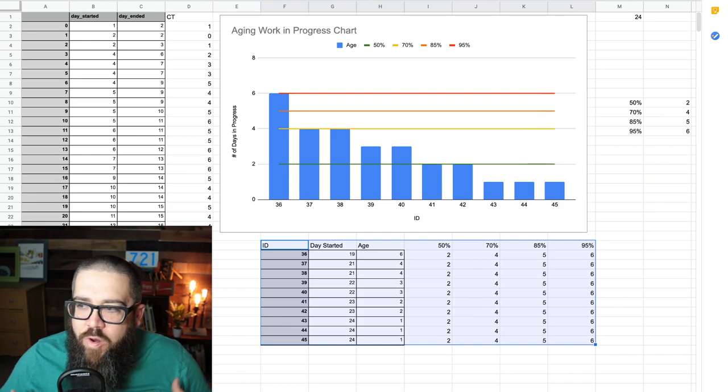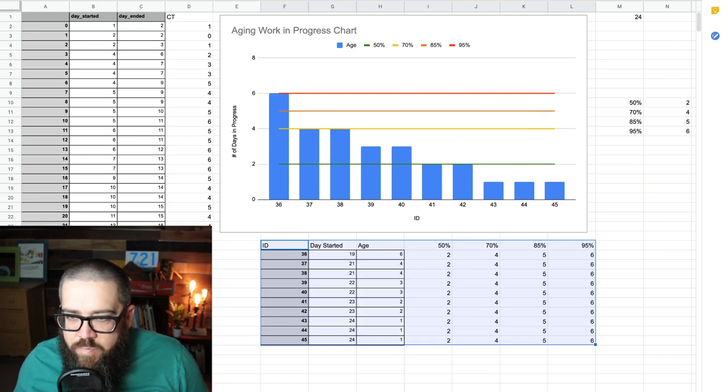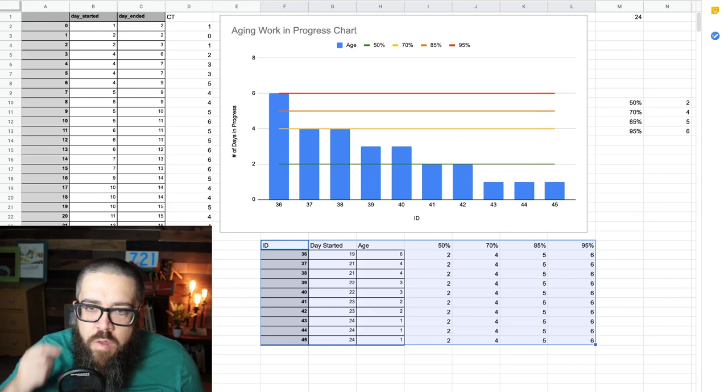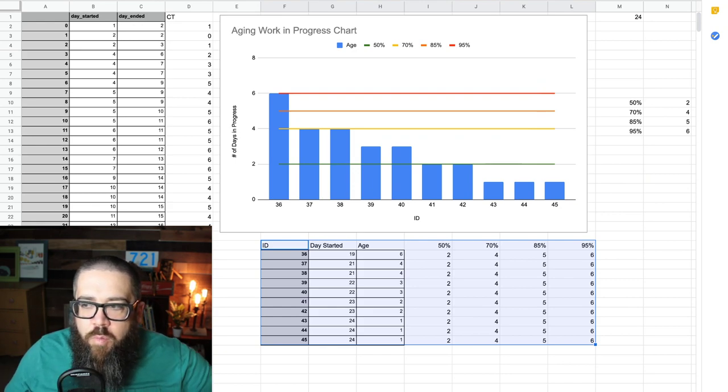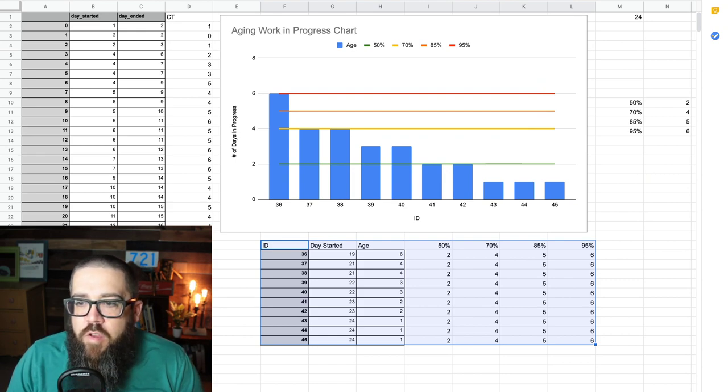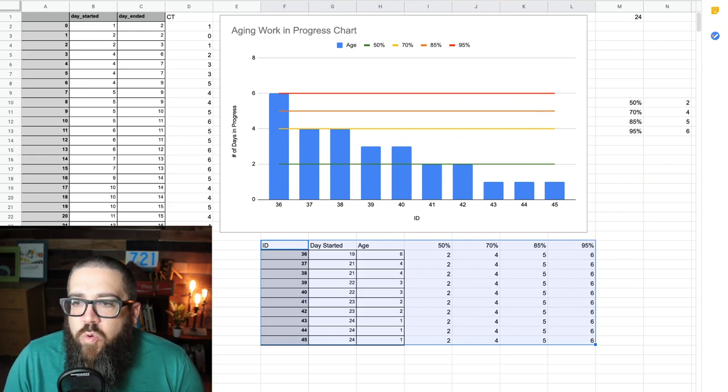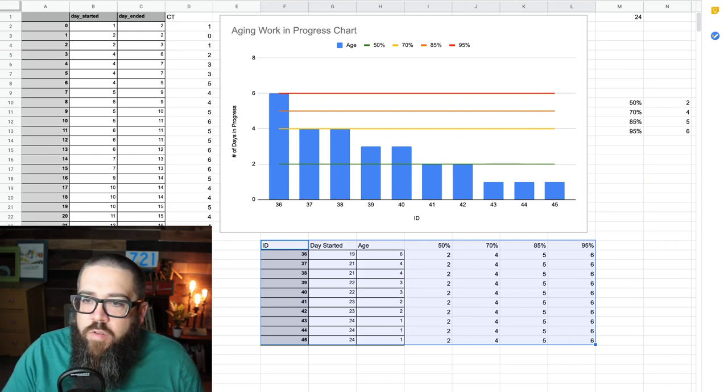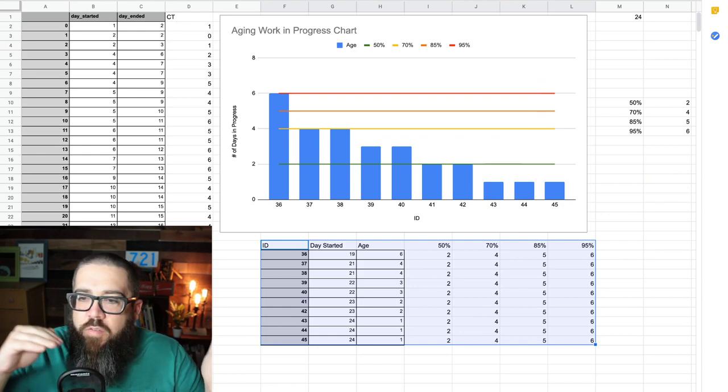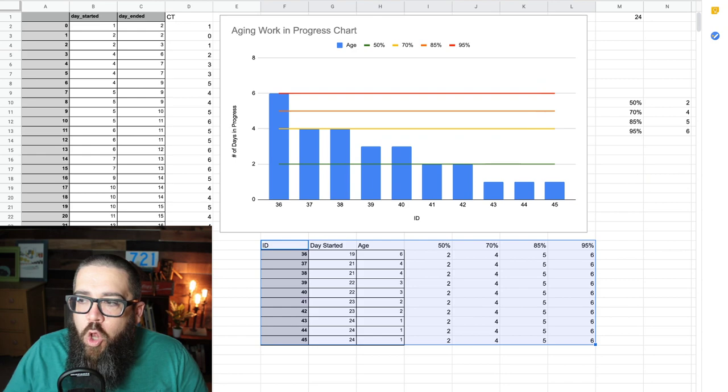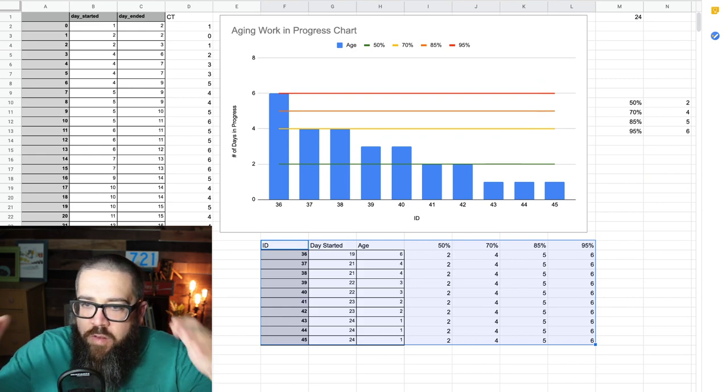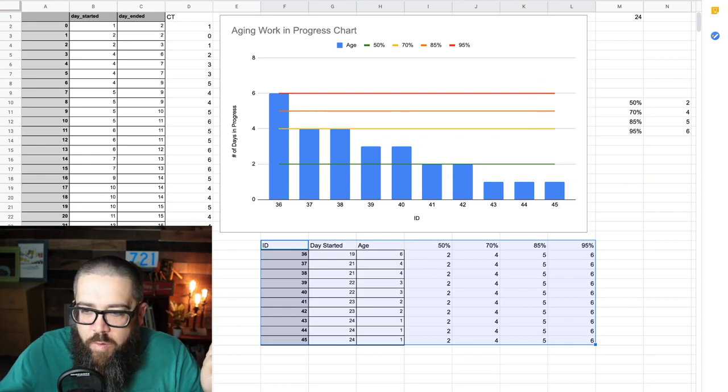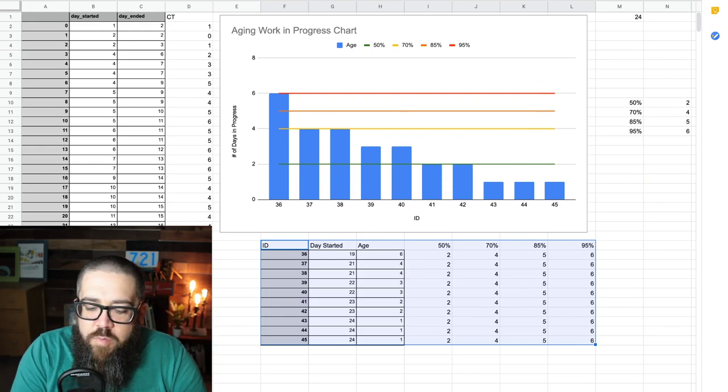Now, here's where it gets cool, though. We take that same chart, and we get the cycle time from the items that have come before it. And that's what we've done here. So, in addition to the blue bars, what you see here is four lines. A line for the 50th percentile, a line for the 70th percentile, a line for the 85th percentile, and a line for the 95th percentile.